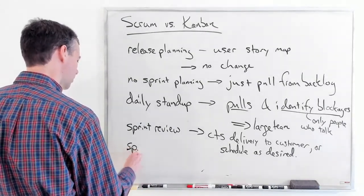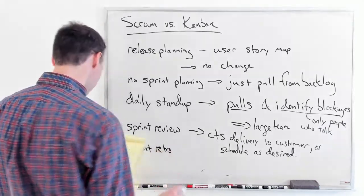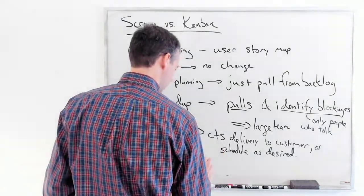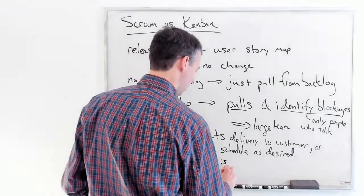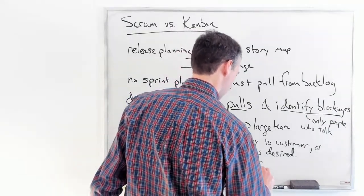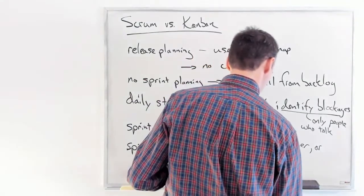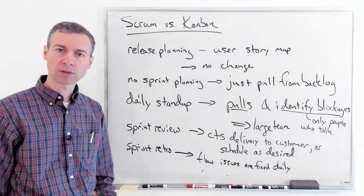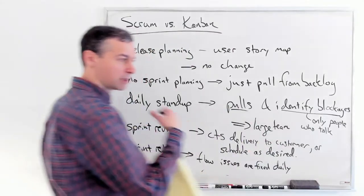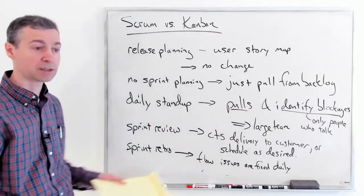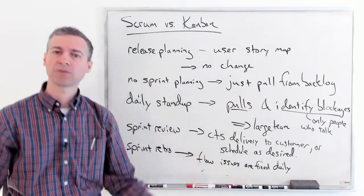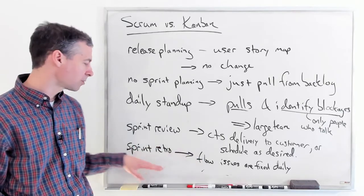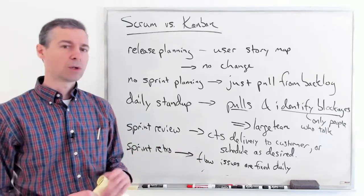What about the sprint retrospective? It's gone too. In the Kanban project management book, it says we don't need it because flow issues are fixed daily. Whenever we have a problem with our process, we work on it. If things are flowing, there's nothing to talk about — no reason to hold a retrospective. When we realize our workflow has a problem at daily standup because there's a blockage, we talk about it as a team and fix what's going on.